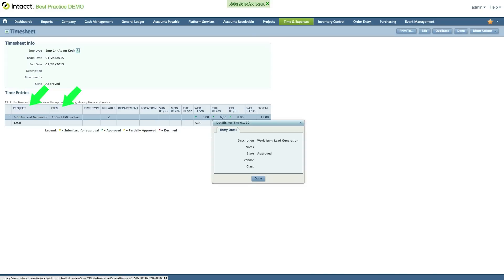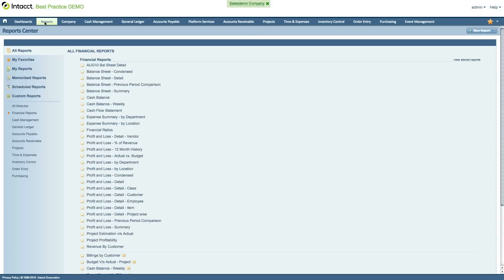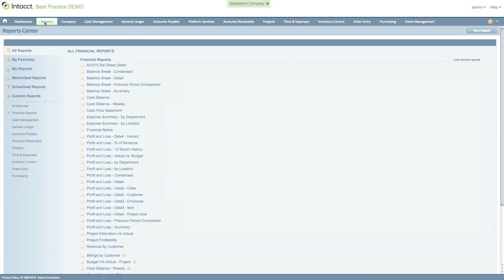Invoices can be created in Intact based on the reported timesheets or milestone completion. Reporting on combined Clarizen and Intact data on the Intact side will help the finance department slice and dice all of the project's financial data based on your company's needs.